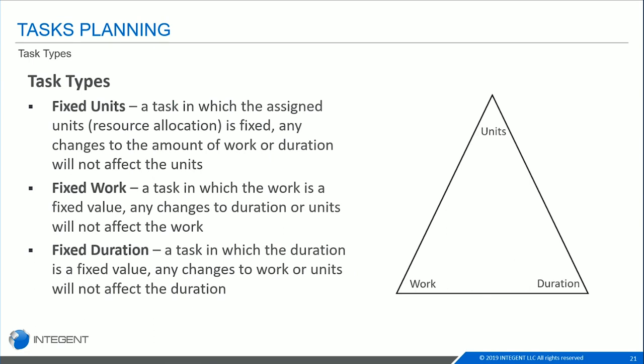And last is the fixed duration task. This is a task in which the duration is what is fixed or constant. And any changes that you make to the worker units will not affect the duration because it's fixed. That's what's going to stay the absolute same.